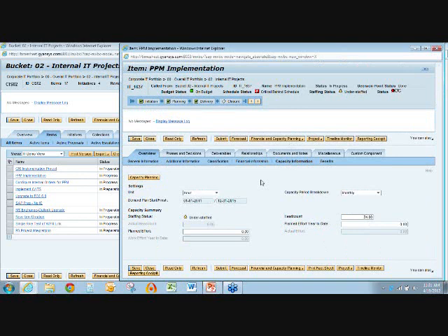For capacity planning, this can be customized as well. Here we have our little alert still showing it's understaffed. We have our unit, which is based on hours, which is definitely what I recommend. And capacity period, which matches, of course, a monthly period for the financials. Across these other tabs, which we won't jump into all today, we have the phases and decision points, which I'd mentioned up here, and these can be set to each one and viewed. We have our relationships and deliverables you can do earned value off of.